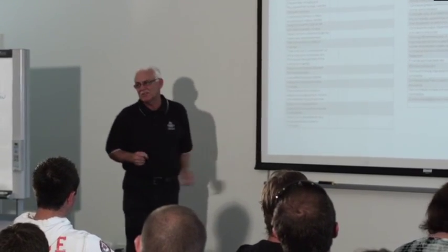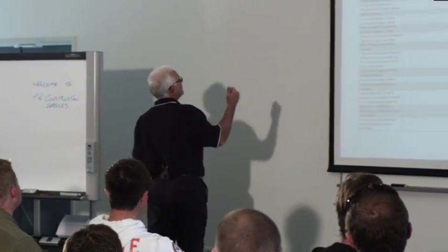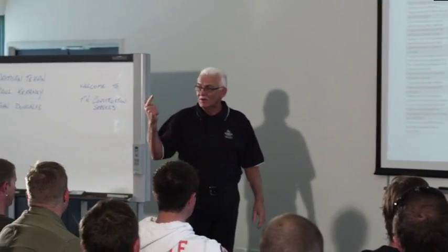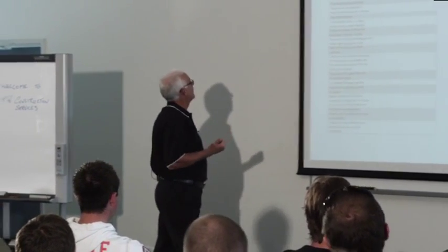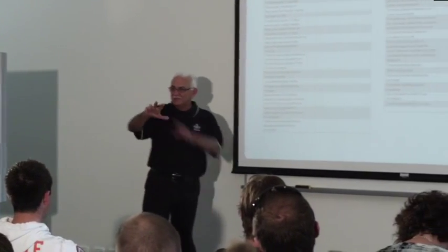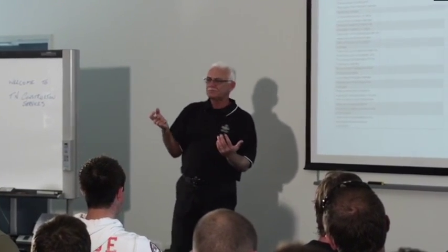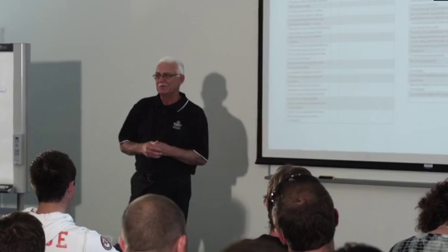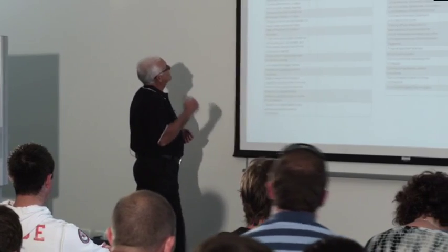I've now put together a contract checklist. So when you're actually signing a contract, you can go through, okay, do I have a contract that complies with the DBCA? So if you've got a Master Builders contract or a HIA contract or a BSA contract, yes, tick. I've got the owner's names and the details, builder's name, the work adequately described. So as part of the contract, you've got to describe what the work is you're going to do. And when you're doing a new home, that's fairly simple. 2-storey, brick veneered, double lock-up, 3-bedroom, garage, right? So you describe the work. I'm sorry that this is hard to see.